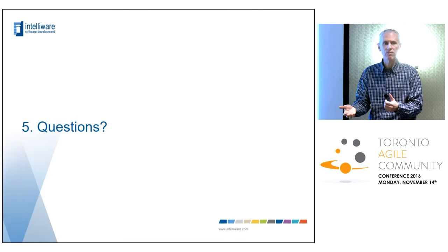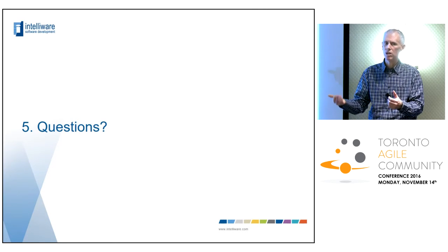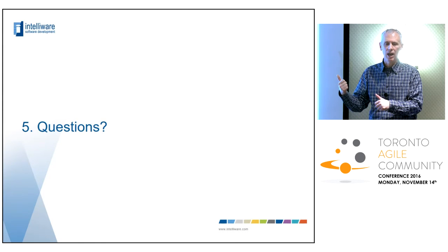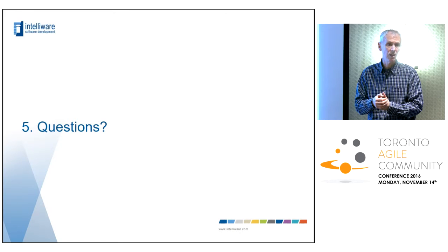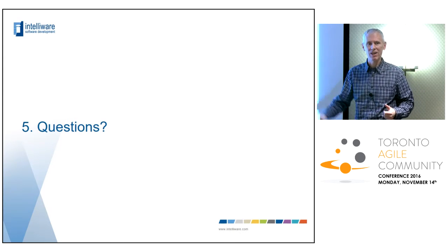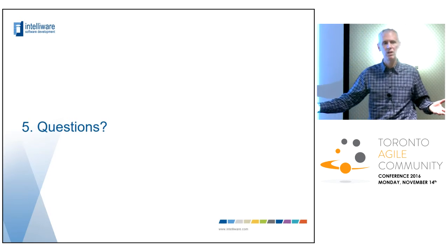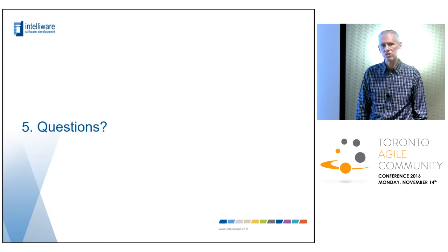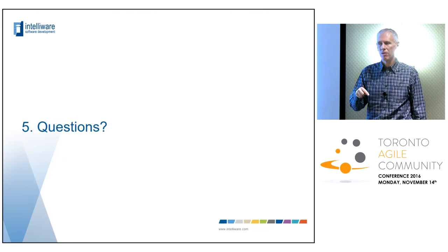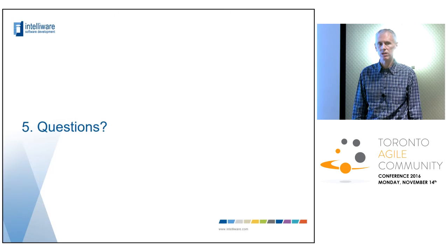And then that's going to spin off a need to probably estimate new stories, re-estimate changed stories. So what we recommend always is that as an outcome of a backlog grooming meeting, the BA should then go back to the team and have a quick one hour, half an hour hopefully, estimating meeting to update any estimates that need to change in the backlog because the product owner changed something. And then that becomes supporting work, right? That's something you can't plan for because you really don't know from one iteration to the next how many stories are going to change as a result of backlog grooming. It could be none. There could be a whole bunch of stories that the product owner changes, which you then need to spend some time with the team doing estimating.